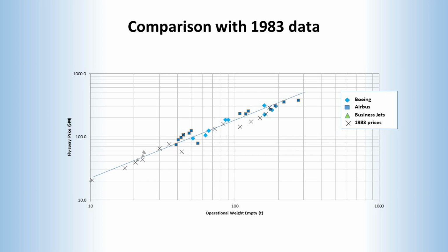Well, of course, there are a lot of changes which involve not only new technologies in the airframe, but the introduction of computer-aided design, some more challenging safety requirements, and increasing real value wages in the industry. Actually, I cheated a bit here when considering inflation. We often think of inflation as a single figure, and normally we're thinking of the Consumer Price Index. But in fact, there are many inflation indices, and which you use depends on what question you're asking. What I used here is an official aerospace inflation index.